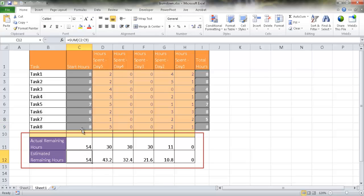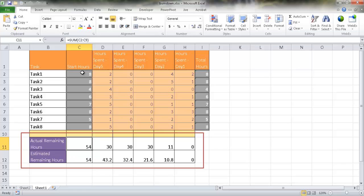Now when we're starting off, we're also going to assume that the actual remaining hours when we start is going to be the same, the summation of those hours.